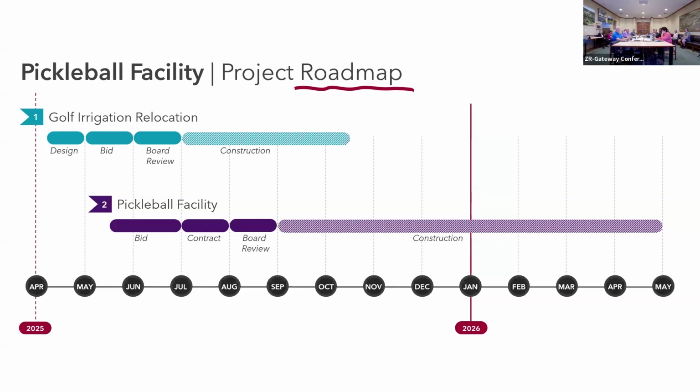And then when we get the actual construction contract, we really can't get it to the board until June, and then we'll be able to start construction in July. So the July is a little lighter color, right? It's because until we get the construction contract, we don't know what the construction timeline is. This is really an outside end.